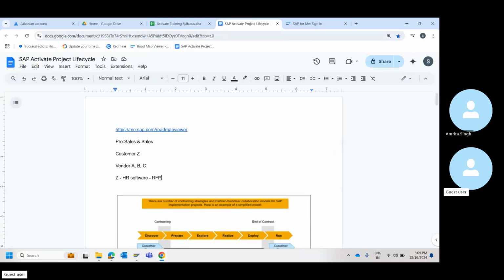These are all the processes that we need to develop. These are all the different business requirements that I have. You give me suggestions on what solutions I can go with, what is the price, what are the commercials, what's the timeline for you to implement, and how many resources you would need. All these things they will be questioning us as part of the RFP.